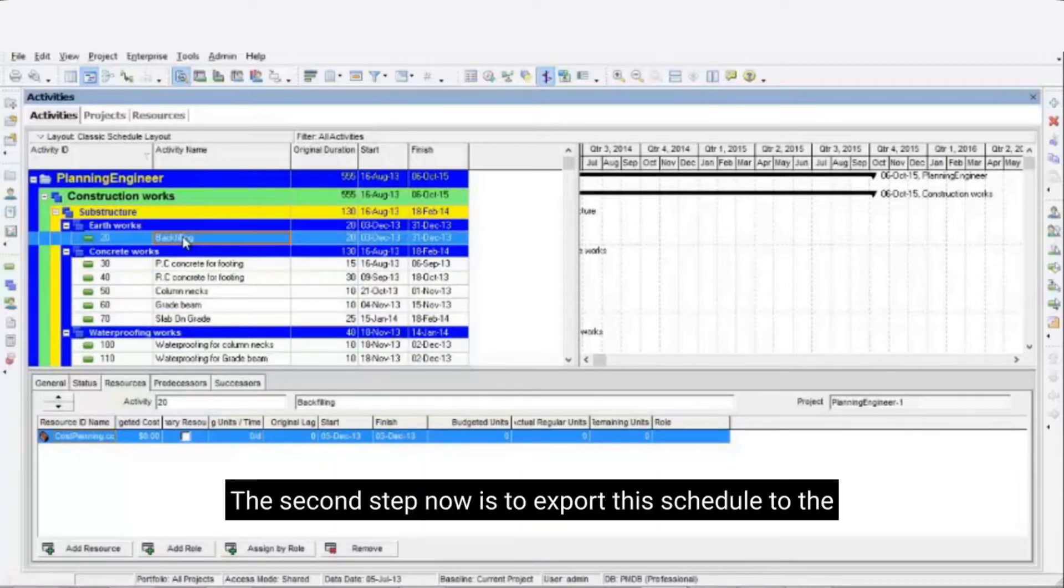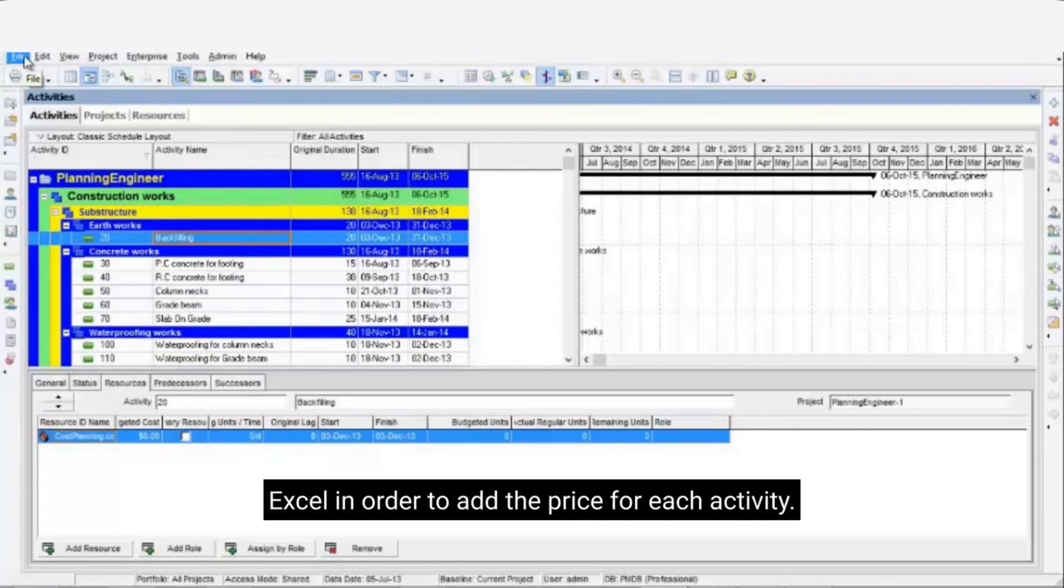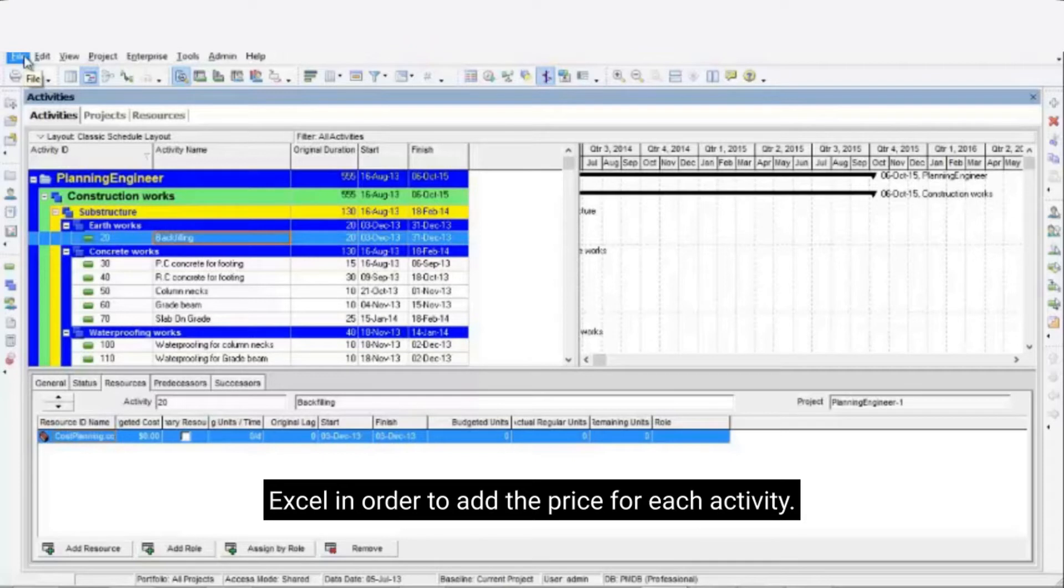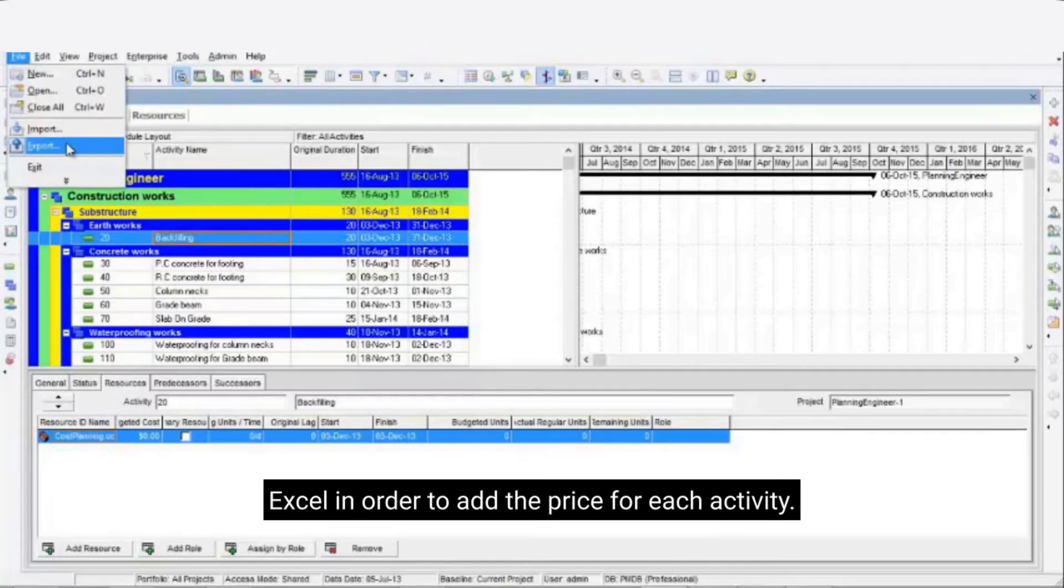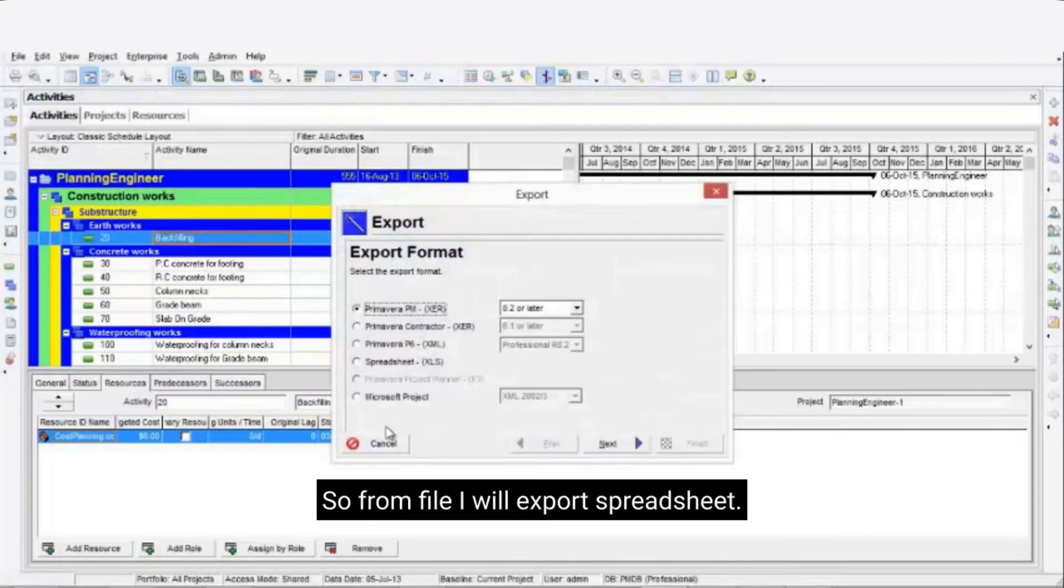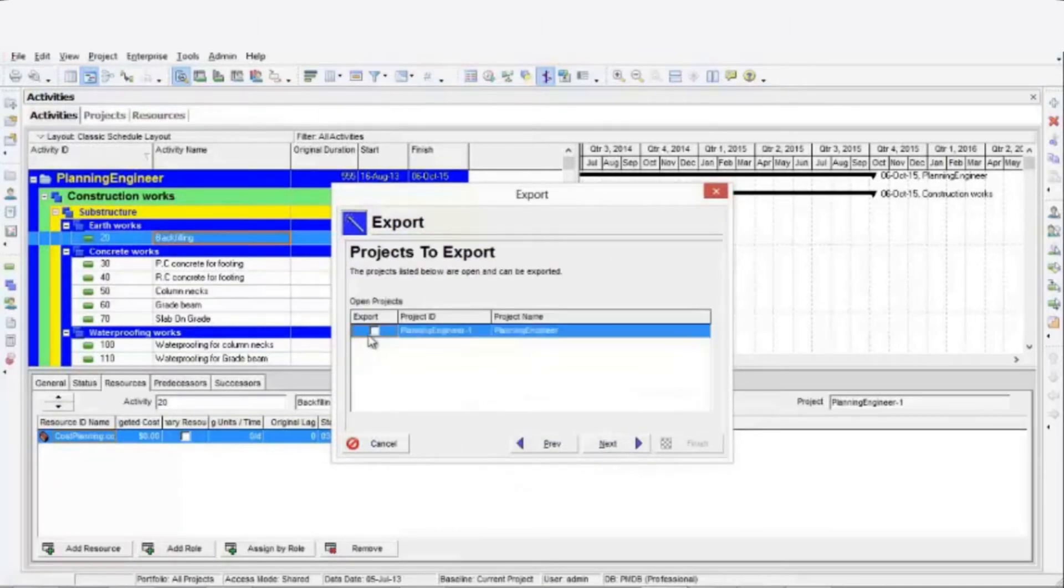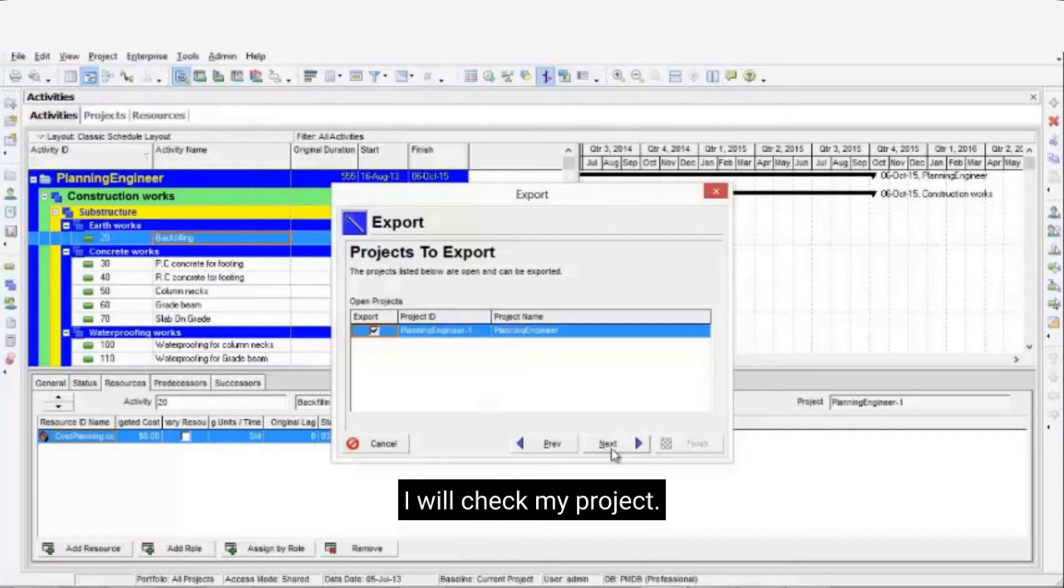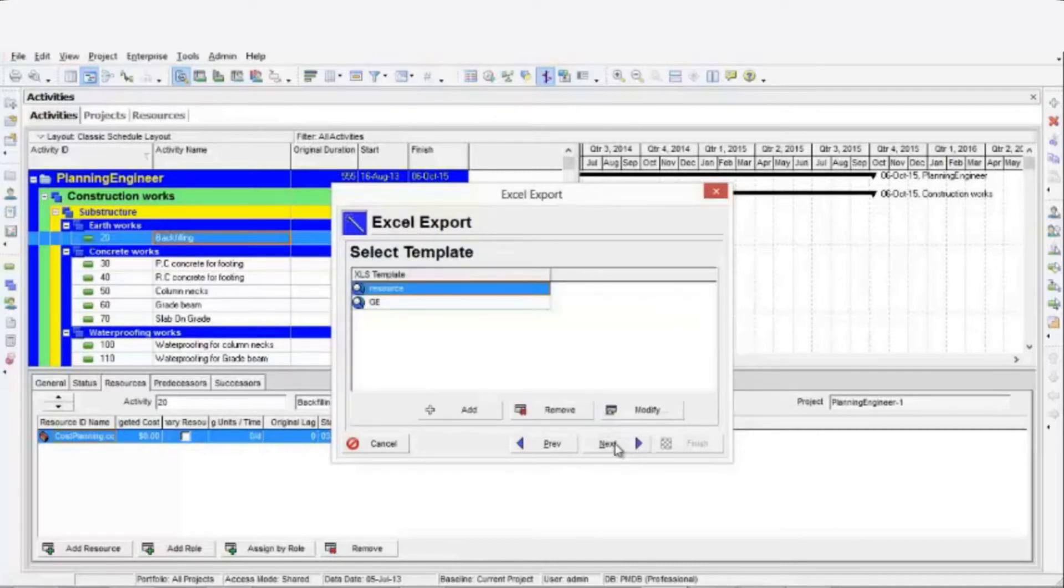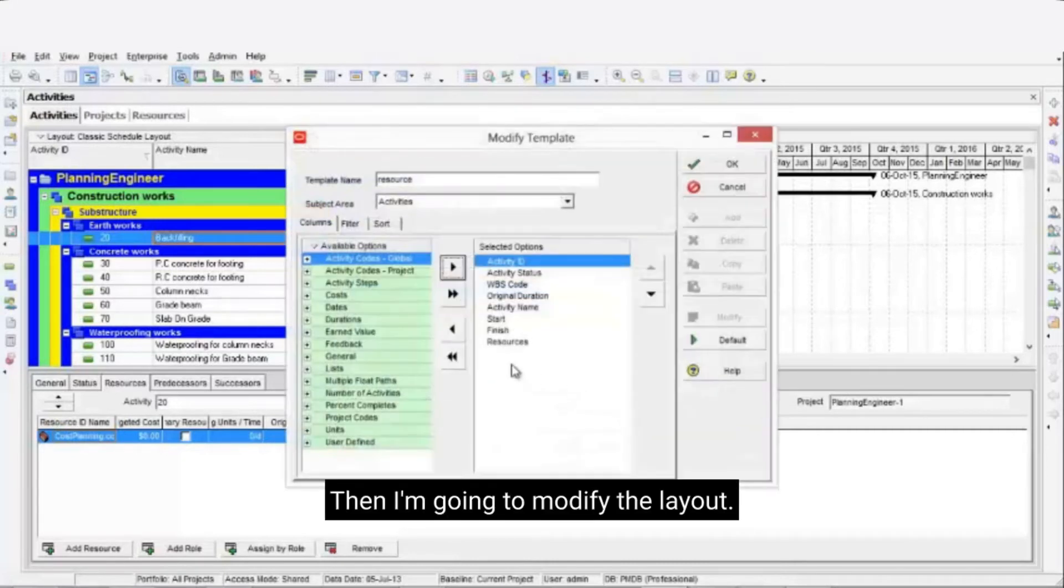The second step is to export this schedule to Excel, so we can add the price for each activity and import again. So from file I will export spreadsheet. Then I will select activities and resource assignment. I will check my project. Then I'm going to modify the layout.